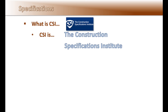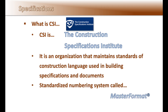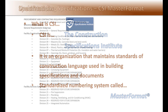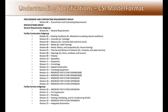Specifications are written using a system called Master Format, developed by CSI — the Construction Specifications Institute — which is an organization that maintains standards of construction language used in building specifications and documents. Master Format is a standardized numbering system with 50 divisions, starting with Division 00 for procurement and contracting requirements, and 49 other divisions covering all the trades and materials used in construction.